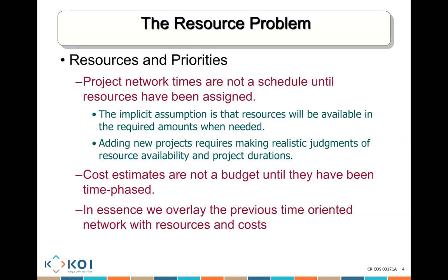Because sometimes a task on a network diagram might require 5 people. While you might say it's going to finish in day 4, because we don't have enough people to deliver that task, it might not finish till day 10. So the whole schedule is wrong and is pushed.